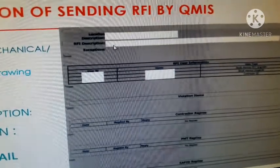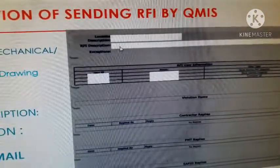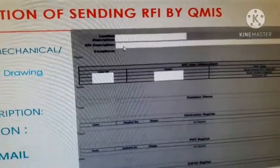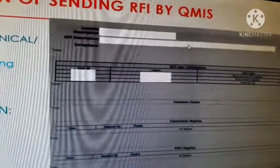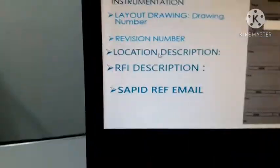In the RFI description field, for example: 'inspection for waterproofing material' or the type of pipe. All details go into your RFI description, including the location. For example: 'inspection for cables in cable tray at pipe rack, cable tray number.' The location must be complete — where exactly the inspection is.